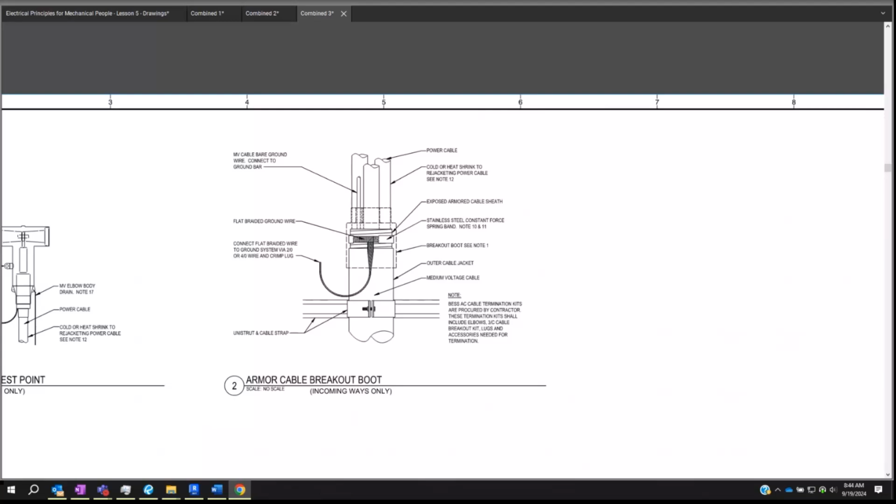If it's really, really important, make sure it's on the drawings. Yes. So my delineation point is life safety on the drawings, somewhere on the drawings, life safety. If it's monetary value, okay, it depends on how much. But if it's something minor, great, whatever, that's fine.